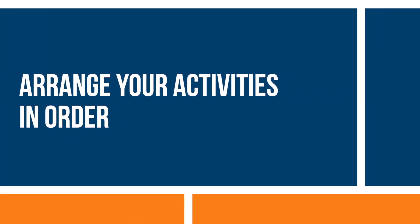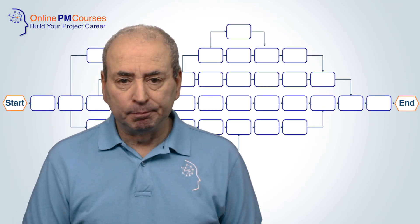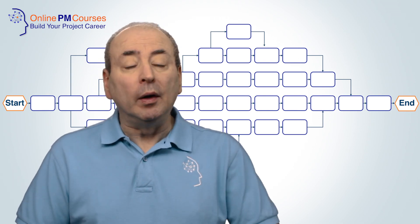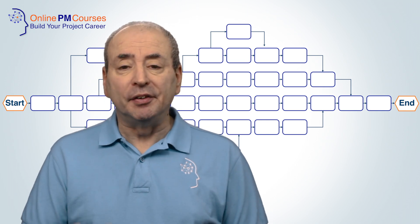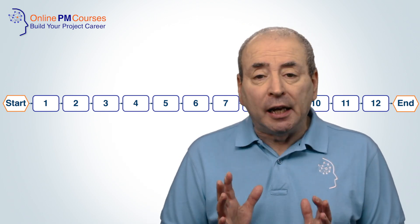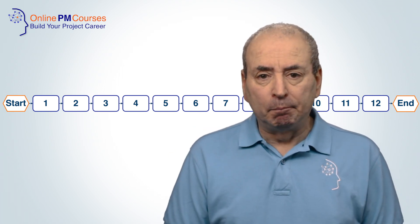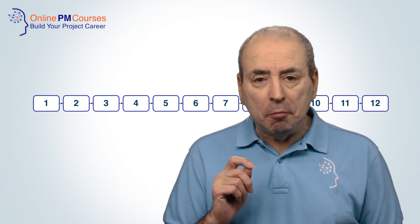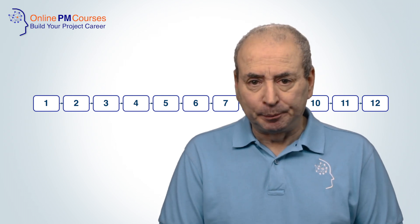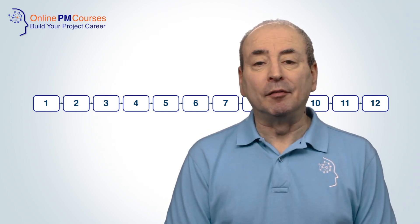Step three: arrange your activities in order. Firstly, you need to define your start and end points — when will you start the project, when will you start that first task, and what is the last task you need to complete to finish the project? Next, place your tasks in sequence. Define a logical order determined by your dependencies between predecessors and successors. Start with tasks that have no predecessors and then link them to their immediate successors. This will create a logical flow, a sequence of activities, that will be the basis of your network diagram.